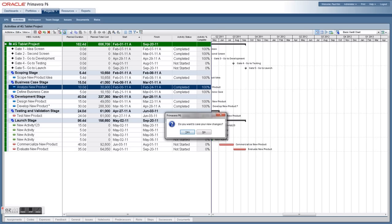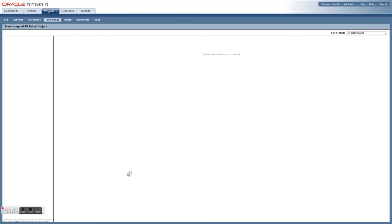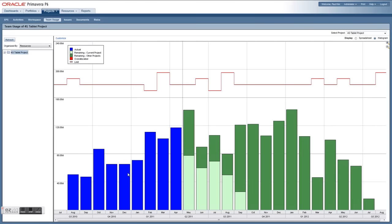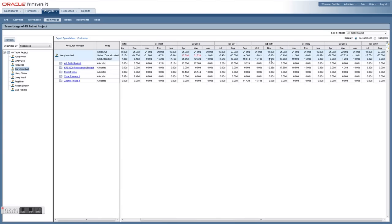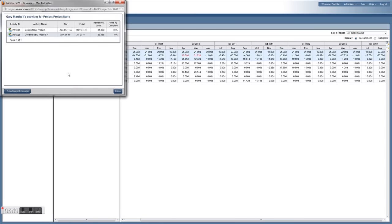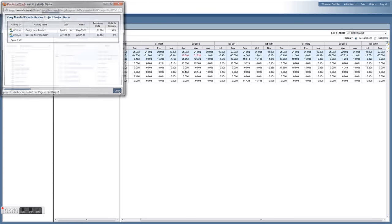The team usage chart in Oracle Primavera P6 gives you a histogram view of resource usage on your project. You can drill into individual resources, see areas that are over-allocated, examine them not just across one project but all projects, and take corrective action or email the responsible project manager.